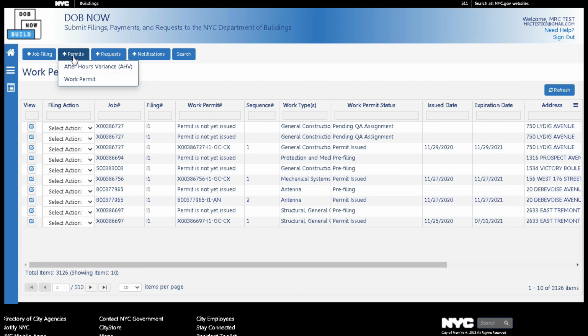Welcome to the video tutorial for AHV permits in DOB Now Build. You need to request an AHV permit if you're doing work before 7 a.m. but after 6 p.m. or on the weekend. It could only be requested by the licensed master plumber, fire suppression contractor, or general contractor that was listed on